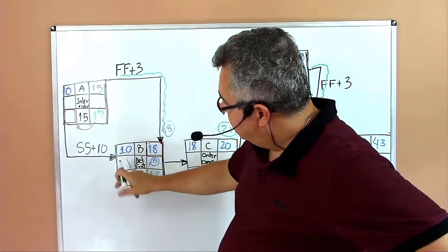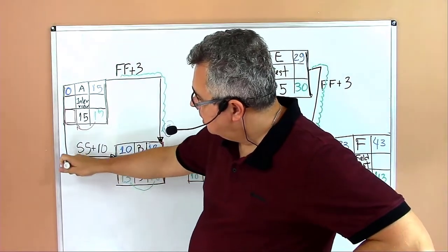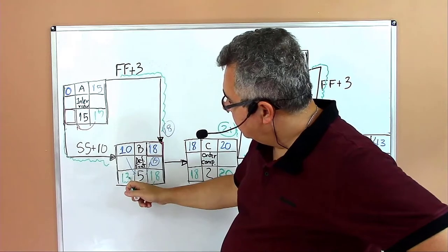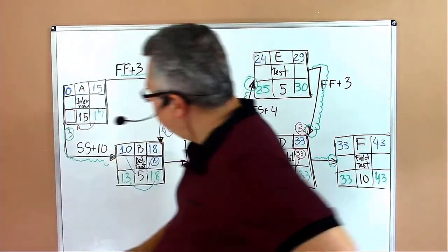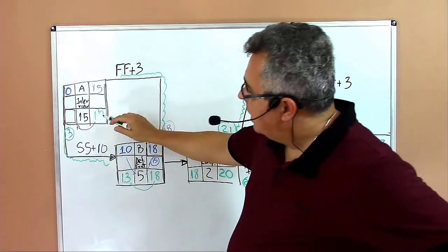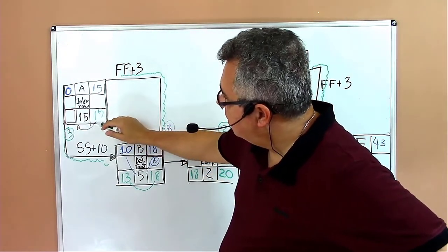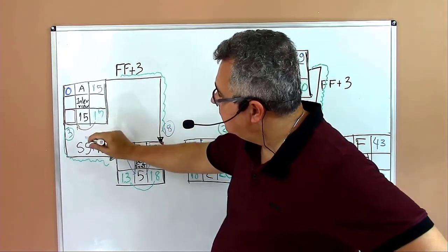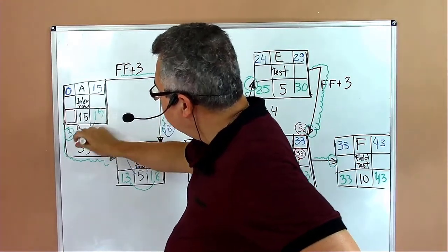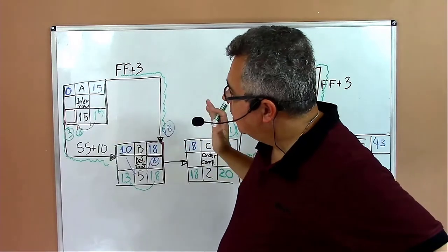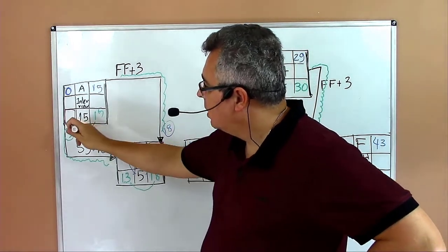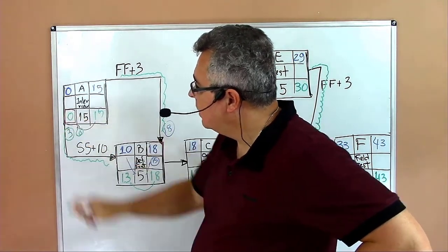13, if I move backwards, I have to take 13 minus 10, I have 3 from the activity B, and from the duration of the activity, that is 15 minus 15, it's 0, I have another condition. So I have to fulfill both conditions, 3 and 0, because I am in the backward path, I take the lowest one I have.